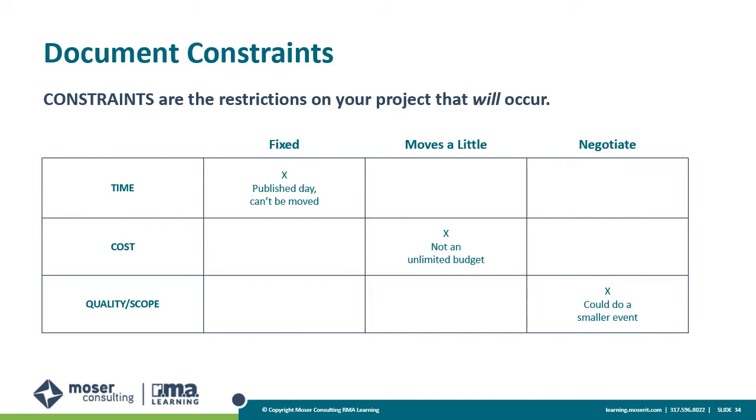The day of caring people think that time is most important. There's only one day they can do this. That's the first one. And you can see it's fixed. It's not being changed. That's the most important one. Then cost. Cost is slightly less important. A volunteer day of caring will likely not get a lot of extra money, but you probably might be able to get some. Maybe there would be some donation. So you can see it moves a little, right? In the middle, there's a little bit of flex there.